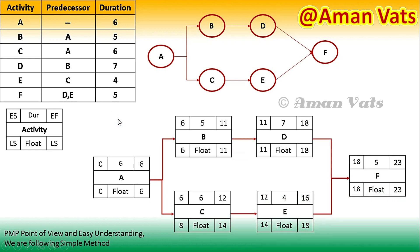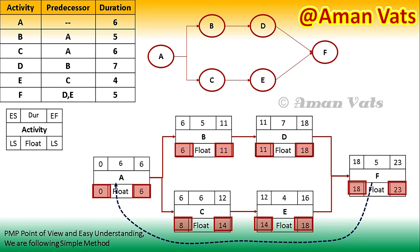I hope you are well aware of how to create this diagram. In my previous video we calculated early start and early finish using the forward pass method, and now we will be calculating late start and late finish using the backward pass method. As a recap: 6 is the duration of the first activity, so starting from 0, 6 plus 0 equals 6. Then 6 plus 5 equals 11, and 11 plus 7 equals 18 — 18 has come here.